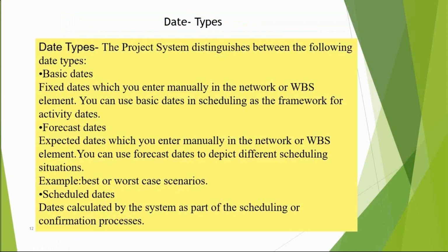Yes, exactly, Prabha. You are on the right path. Scheduling is nothing but establishing relationships between the activities. Meanwhile, we will be doing manual entries only. We will be scheduling the things manually. But once we establish a relationship, as I told you, once I change the dates in my activities, automatically it will get changed in other activities also. Because the relationship is being established between the activities, between the networks. Okay.